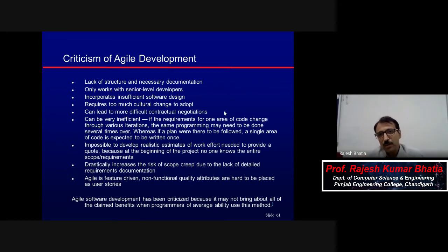In this case, it is considered that newcomers should be included in functional testing, when functional testing is going on for a particular sprint. Why so? Because functional or black box testing is on the basis of the requirements. If they want to write functional test cases or perform functional testing, they need to understand the requirements. So indirectly they will understand the requirements for this sprint, and then they can correlate them with the backlog features. Once they come through one cycle, they will understand, and then in any sprint they can be introduced. That is also fast in this case.